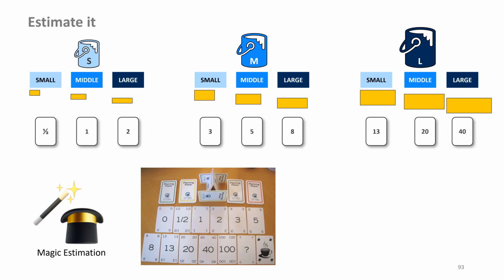If, for example, person A places a 3, person B an 8, and everyone else in the team a 5, then those who have the lowest and highest estimate present why they decided that way. This has the advantage that team members can now exchange information with each other. It also prevents the expert's estimate from becoming a lighthouse for the others' estimates.